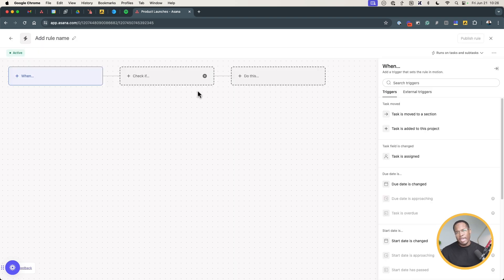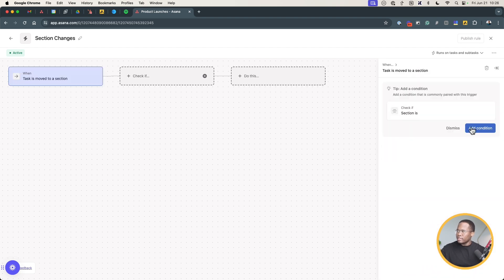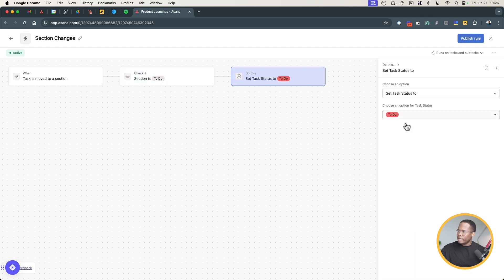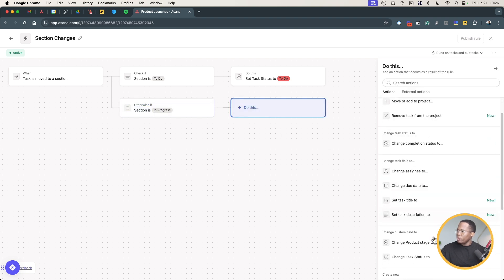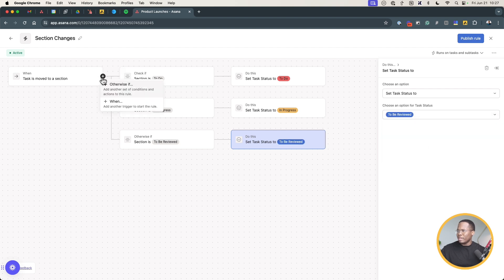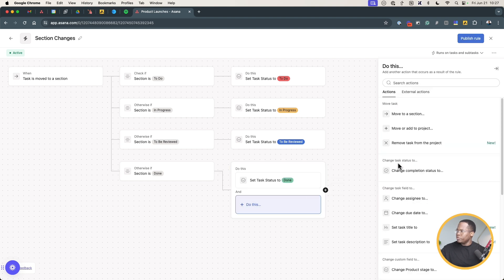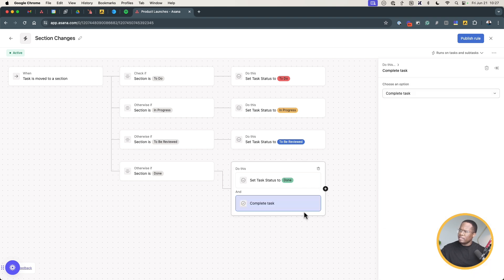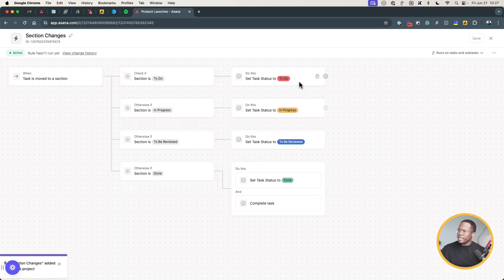Instead, I'm going to use the 'Otherwise If' branch to handle everything in one rule. I'll name this rule 'Section Changes' — this will handle all actions when changes are made to any of our sections. I say: when task is added to the 'To Do' section, change the task status to To Do. Then 'Otherwise If': when task is added to In Progress, change task status to In Progress. Otherwise If: To Be Reviewed, change status to To Be Reviewed. And finally when it's Done, change status to Done and also complete the task. I publish this one rule.